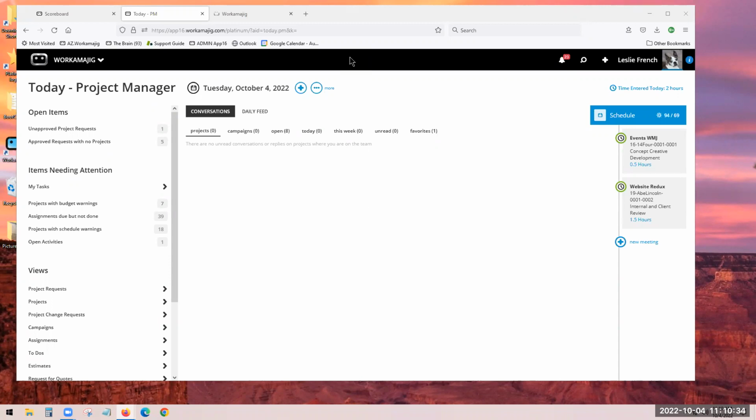You can copy from an active project in that template field. I think it's a bad idea, but sometimes, I say sometimes with quotes, it's a good idea to copy from a project because it was perfect. You want to recreate it, but you need to know if you copy from a project, you will copy over some headaches like those constraints.